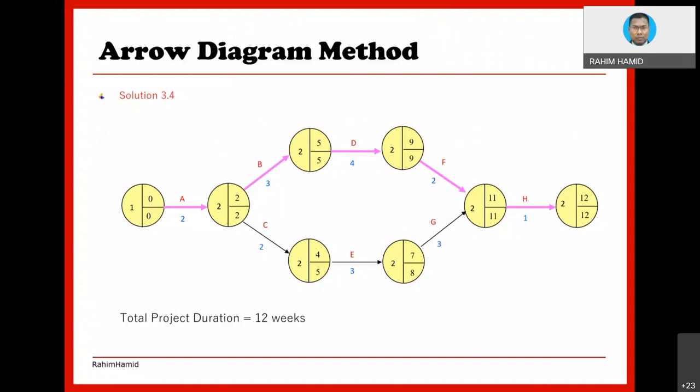A stands for activity A, and then 2, this is what we call the duration of activity A, and it goes on until H, for instance. When we start doing the calculation, we start here, this value zero there as early start. This one is basically what we consider early finish. This one is basically late start. And then late finish